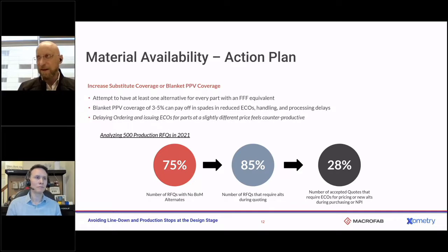Yeah, and that brings up a good point, because we have what we call a strategic sourcing team in-house. So same here. When we can't buy on the open market, we go to strategic sourcing and we can solve a lot of problems there, but it's at a higher cost and typically a longer lead time, because once we start going out into strategic channels, we've got to do part validation and make sure they're not counterfeits. There's a pretty heavy process involved in that. So we always want to avoid going there, but sometimes you can't.